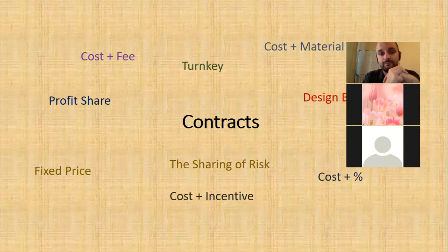Yeah. And there is also for time risk and the quality risk. Yeah. It's usually used for time. This is the big one they use it for, because the others are a little bit harder. But time is a big one because if you remember when we looked at time management, the opportunity cost of time is absolutely huge. And so that's where the real cost is if there's delays to a project.